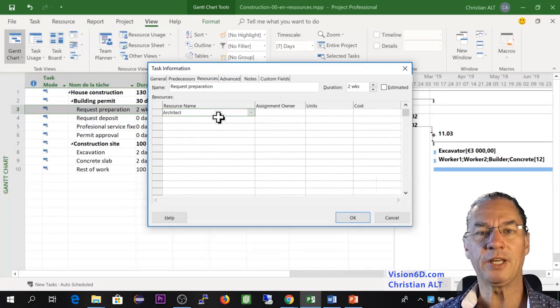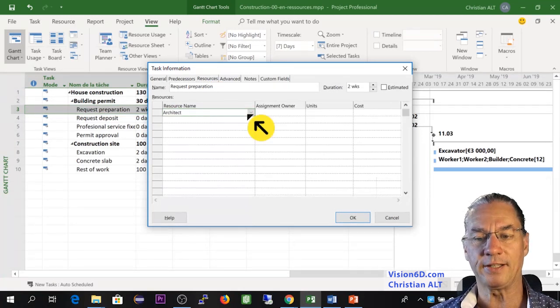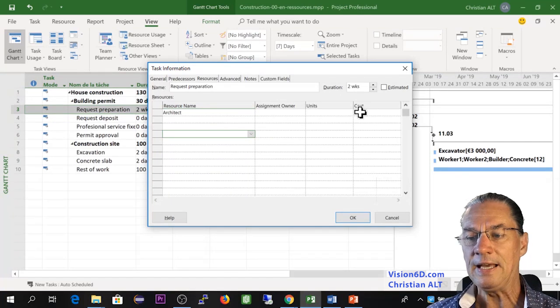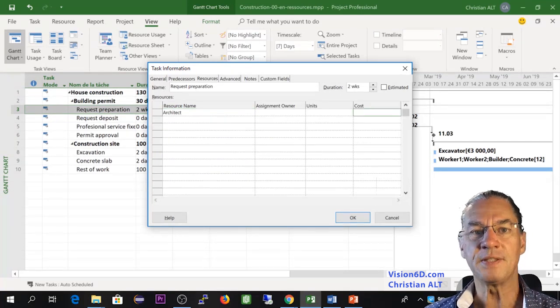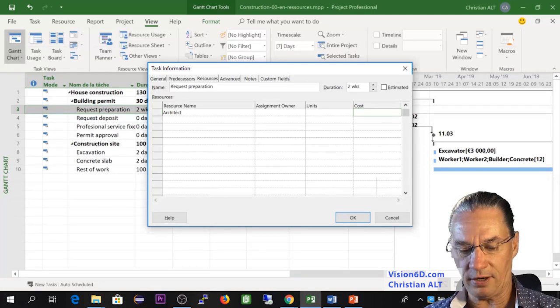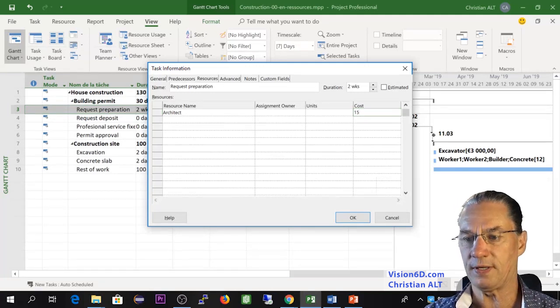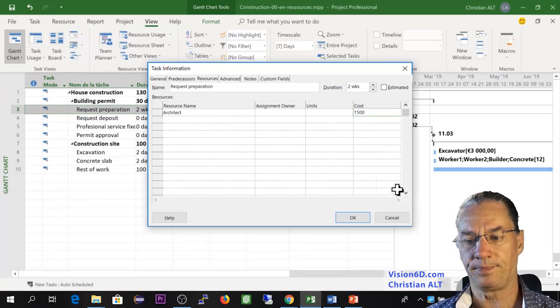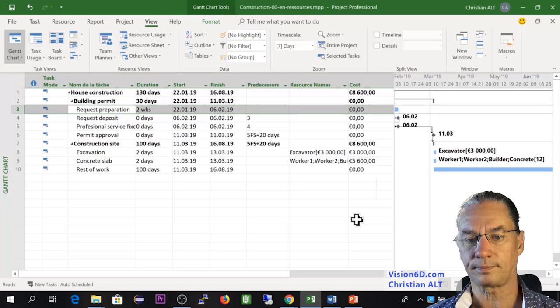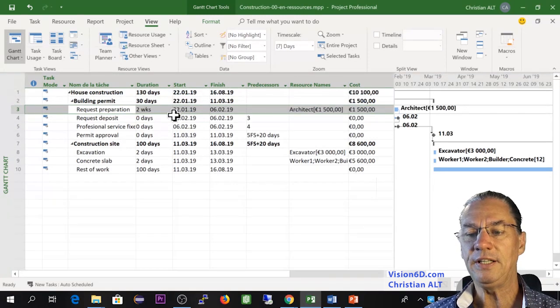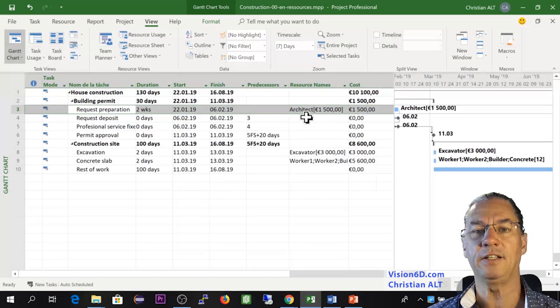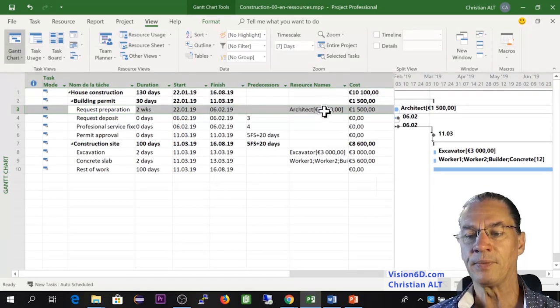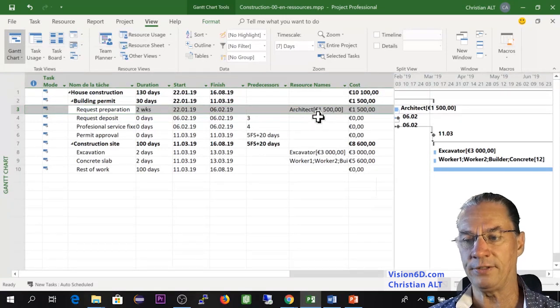And here in the column cost, since it's a flat rate, we are going to say that the architect is going to charge us 1,500 for this task. And now here on the line, you see that as we headed for the excavator, the architect is now defined as a cost resource for 1,500.